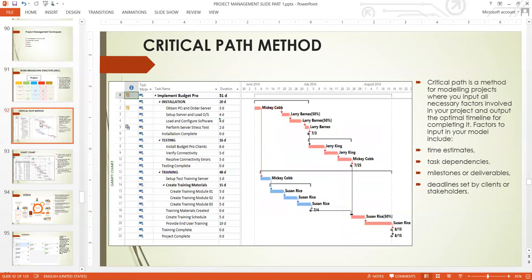Then we have the critical path method. Critical path is a method of modeling a project where you input all necessary factors involved in your project and output the ultimate timeline for completing it. Factors to input in your model include timeline, task dependencies, milestones, deliverables, and deadlines set by the client or the key stakeholder. So the critical path helps you to look at the critical areas you need to